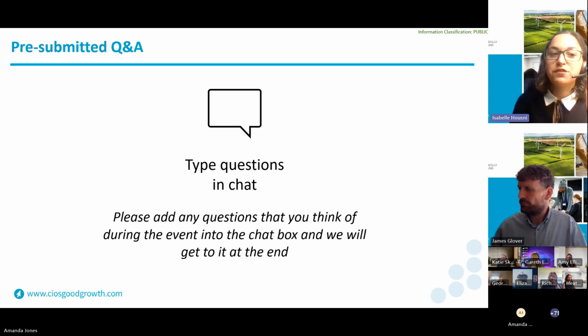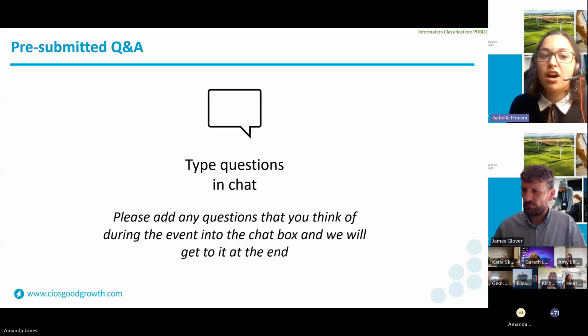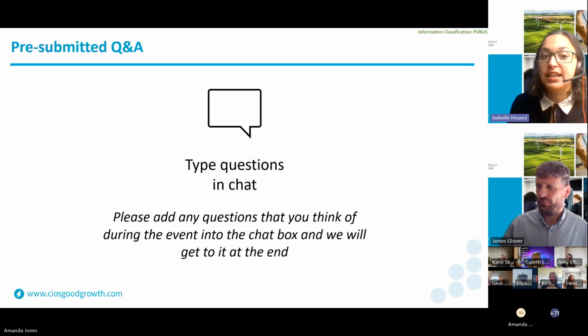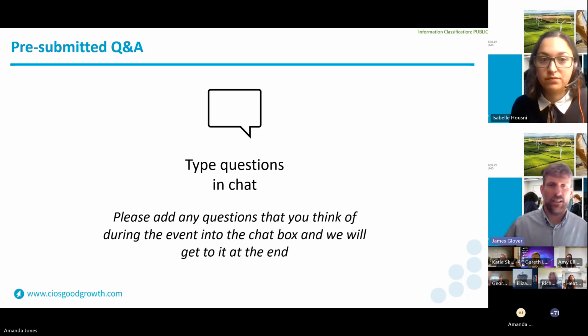So question 14, what is the latest date that our contractor can invoice us? Is it the 31st of March 2025 if we make payment on that day? So the invoice must be dated no later than the 31st of March 2025.